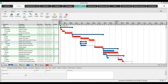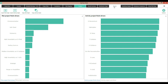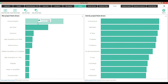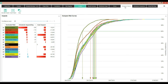Thanks, Rusty. What improvements have you made in Saffron Risk over PertMaster in understanding the impact of these risks and how you go about reporting on them? Well, I think we've made two really big improvements. By separating out the risks into a risk register, we're able to always show you the task sensitivity, which is shown on the right here, versus the risk sensitivity. This got quite confusing in PertMaster, and it's much clearer in Saffron Risk. The second thing is, often people wanted to know not just which is the most sensitive risk, but also what is the time and dollar impact of that risk. And to do that, we've added a new report called the Sensitivity Analysis.